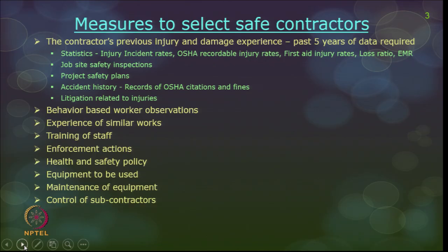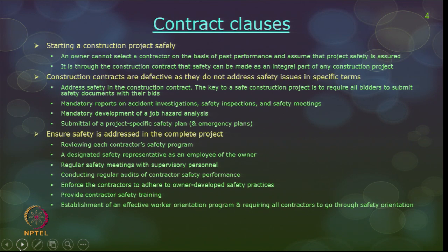Look at litigation related to injuries — whether the contractor has been involved in court trials or arbitration cases due to injuries or unexpected events in the past. Also consider how he has trained workers or staff, his control over subcontractors, his equipment availability, and maintenance policies on equipment, since equipment malfunctions can also lead to many injuries. These are statistics through which an owner can select a contractor who will be safe based on previous experiences.